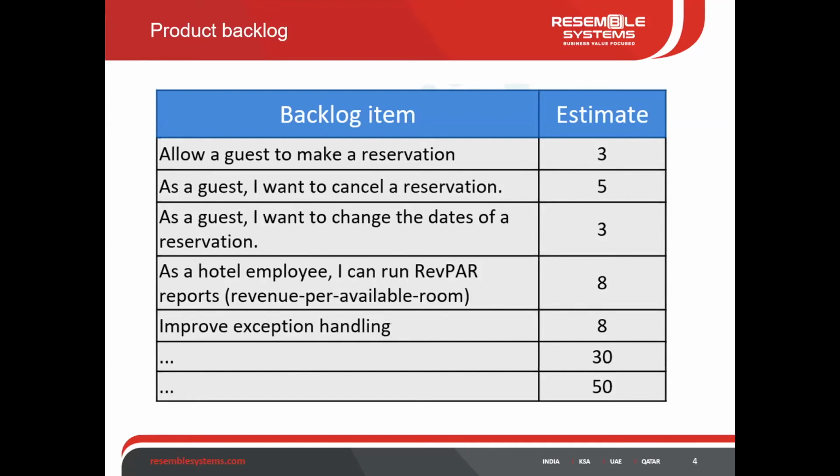So I can provide a user story instead of giving the requirement. For example, normally when we write the requirement document, you provide, okay, it should be integrated with such and such application. Instead of that, I can provide that as a story, which is more meaningful for the business and also more meaningful for us. So I can say, I need to have a feature in the leave request application showing what my pending leaves are. So from there it's understood you need to integrate that.